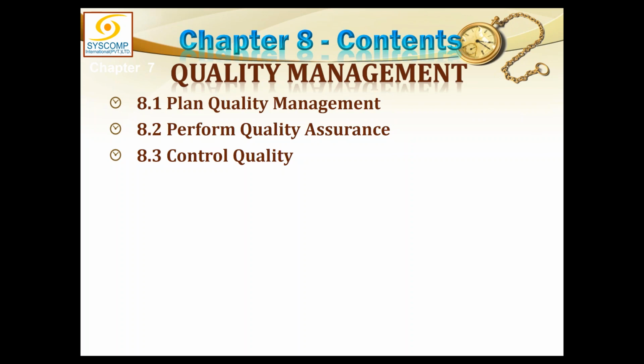Quality control has absolutely nothing to do with the process of the project. It is just supposed to check and verify whether whatever the deliverable or part of deliverable is being produced is according to the quality specs, quality requirements, the tolerances. If it is all right, then we'll verify that product, that deliverable, and after passing the quality control check, it will become a verified deliverable.